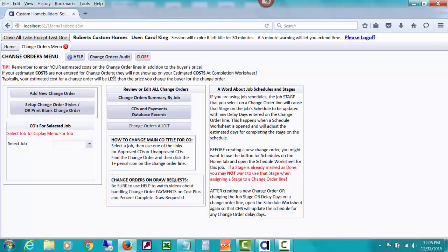In all my videos, I've been showing how I'm entering an estimated cost and even issuing POs for those estimated costs of the change orders, and that's your cost, not the cost to the buyer. Typically, your estimated cost for a change order will, of course, be less than the price you charge the buyer for the change order. So you don't just want to enter a price for the buyer. You need to enter the estimated cost. That's what this program is all about, is you tracking and looking at what you're expecting your cost to be and so on. It's like a mini budget when you enter your estimated cost for a change order.